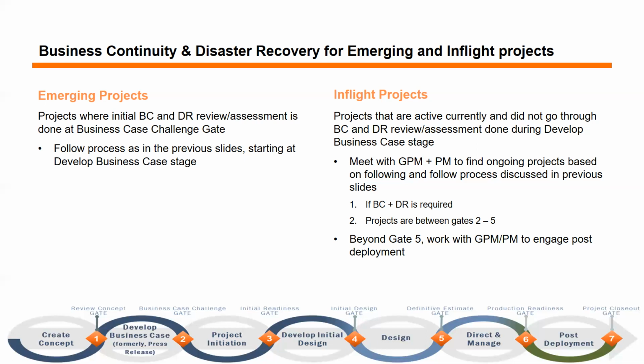All projects that are past gate 5, that is in direct and managed stage or post-deployment, we will follow up with the GPMs and PMs or SMEs to guide through business continuity and disaster recovery planning after the application or process is live and in production. And that is all we have for this topic for today. I'll open it up for any questions.